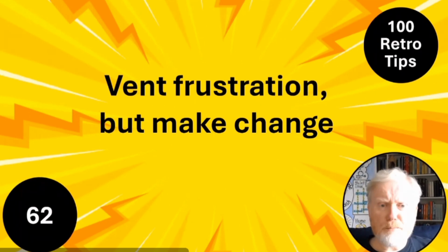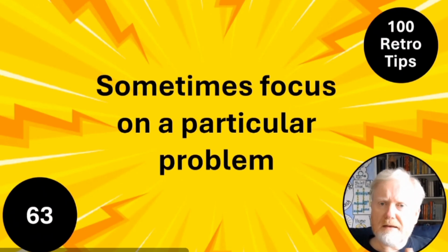There's no point just venting frustration. It's a useful function of retros, but you need to actually make change if you want to improve things. So you can also focus on a particular problem. Maybe we've got a problem with releases. We're going to just have a retro on that and nothing else. Real deep dive. Don't be afraid to do that.